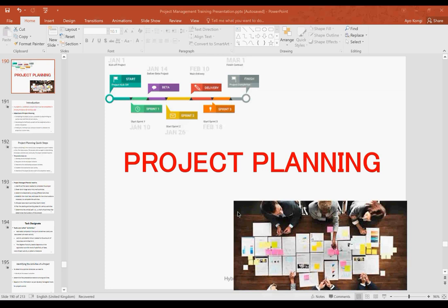An activity that is less than 1 day, we don't really want to deal with it. Half a day activity, do we really want to put that in our plan? Does that make any sense? We're saying that every activity must have resources attached to it. It is inside the schedule management strategy that you see all of this. All activities must have resources, must have someone doing the job.